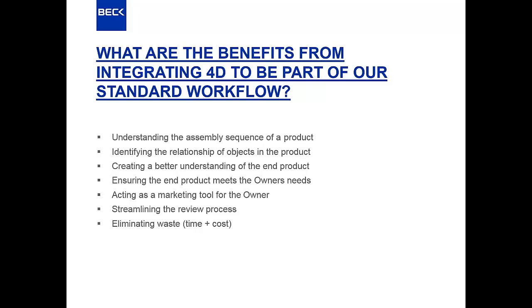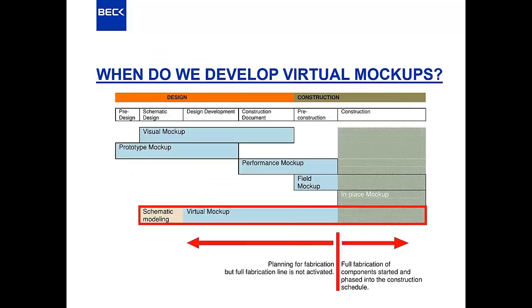I think these are the good old days right now, because it's an opportunity to use 4D during the design process to vet out the constructability of what we're drawing in real time. And there is a point you have to think about of when you can start a 4D sequence, and it's very early on. Our process now is really once we start DDs.